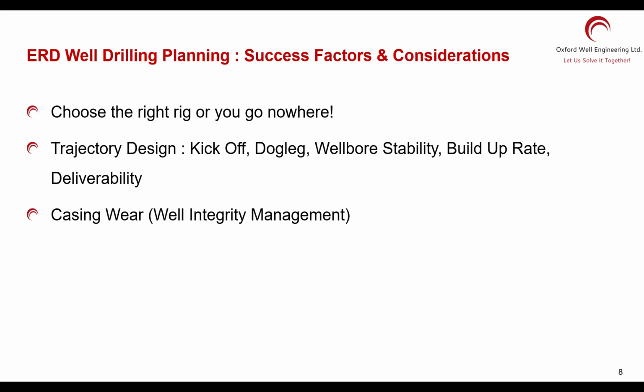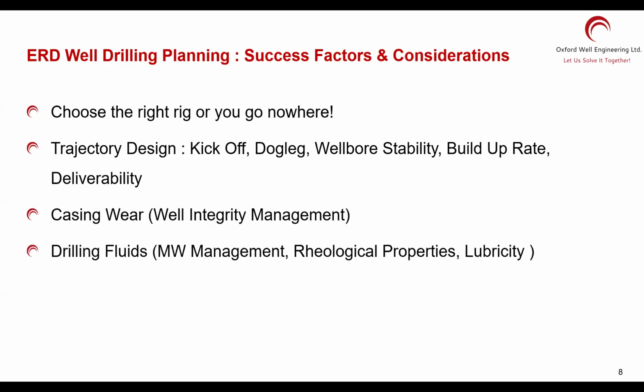I've done this exercise. We got rid of casing wear because we used certain standoff equipment and subs, which we incorporated into certain zones. It solved the problem, and we checked it afterwards when we ran the wireline. The casing wear was not so much. Drilling fluids, there's a common sense. You are in the environment of drilling fluids. You better do a good job with it, okay?